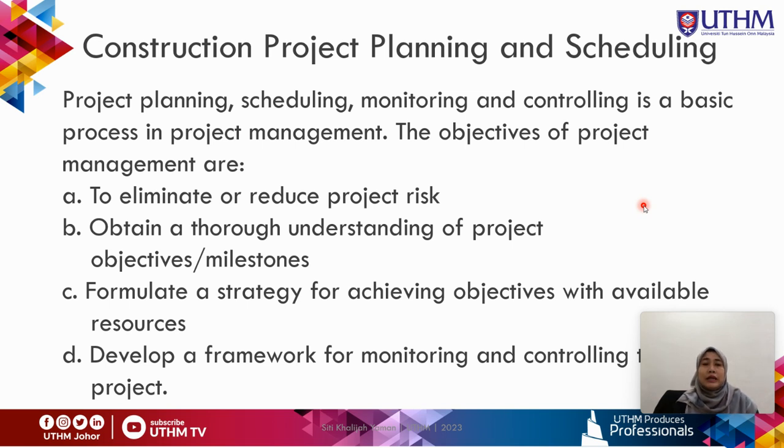So basically, the objectives of project management are, first, why we need to do the planning and scheduling is because we want to reduce or eliminate, if possible, any risk associated with the project. For example, risk of delay because of weather, risk of project stoppage due to material delivery issues or due to shortage of resources.